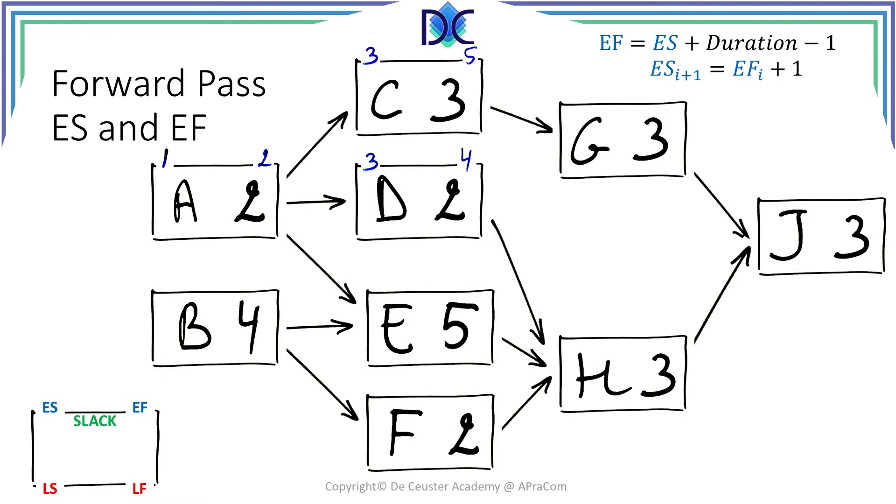Now for activity E it's a little bit different. We know when activity A is finishing but E can only start when A and B are finished. So now we first have to calculate early start and early finish for activity B. So B, again no predecessor, can start on April the first and will finish on April the fourth.